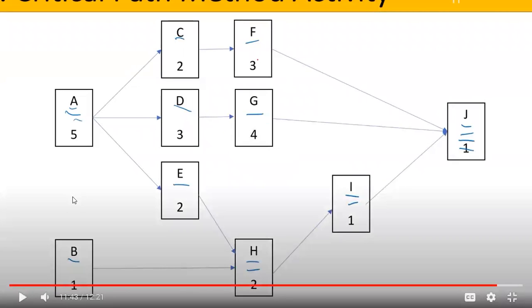All right, you understand that? If you do this even in 1 month, even half a month, even a couple hours, it's still not gonna affect the critical path. The only way to affect the critical path is if you change something on the critical path itself. You understand that, people? Yeah.